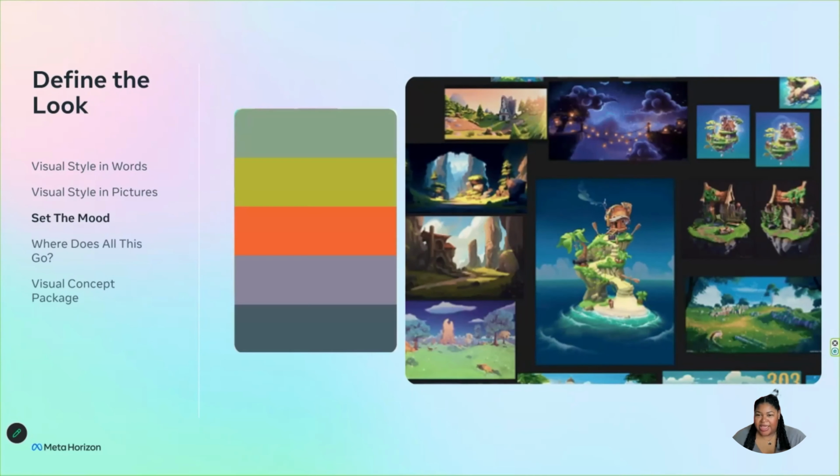The order that I am presenting this is not necessarily the order that you have to do. This order is probably the order you want to do. For character and assets, you really want to prioritize the largest pieces, and that could be scale, but in this context, I'm more referring to the importance of the piece. So, for example, the character that the player controls. What does the player character look like and how is it moving in the world? That's going to be a super critical piece to your assets and your game. So you want to start there so that if anything in your design is going to require a change in some downstream asset like the environment, you are able to plan for that ahead of time.